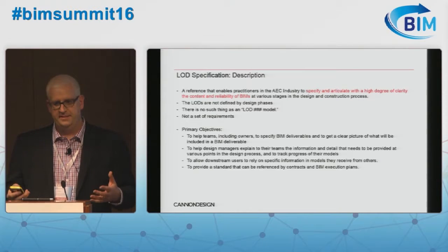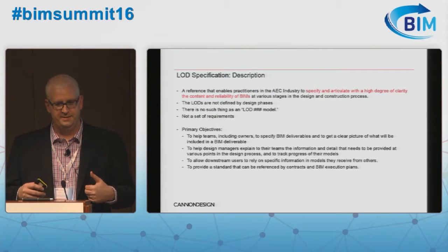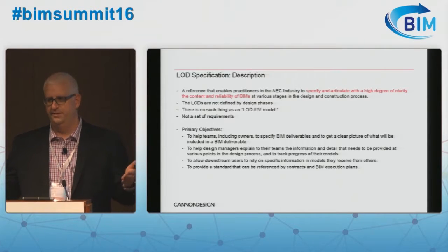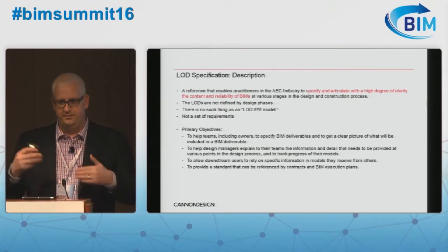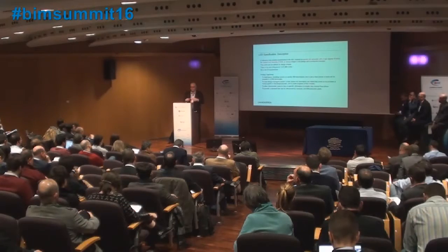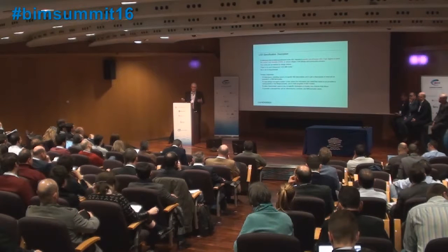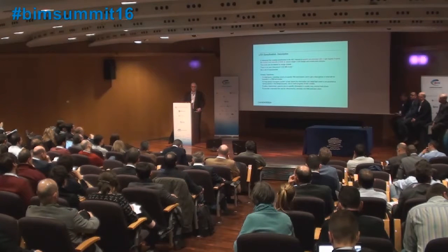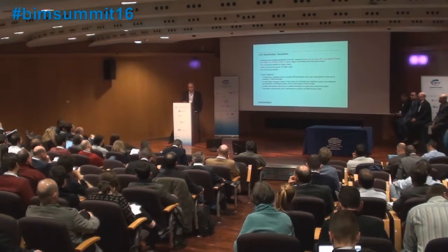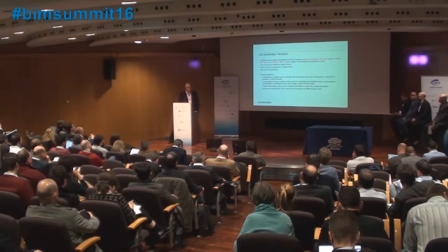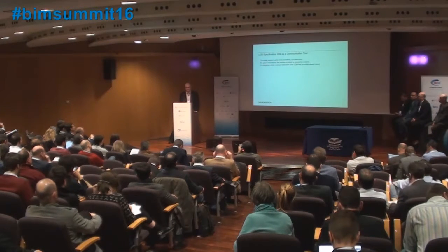And the fact that it is based on model elements, one of the big things we always talk about, and then we hear about in the US always, is there's no such thing as a LOD 200 or 300 model. Different model elements develop at different stages. They have different use cases based on the project team, project delivery model, and a lot of different variables. So those are some of the big benchmarks that we always talk about and share with project team members as we're working to set a clear expectation.